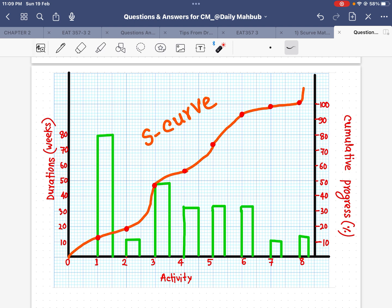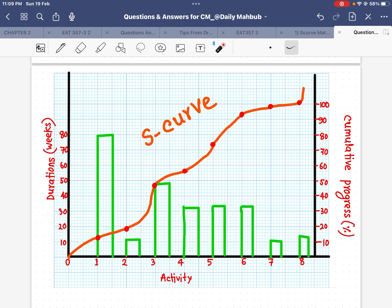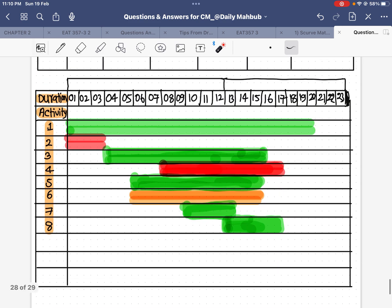For the S-curve, the first thing to do is set up the axes. The horizontal axis is duration in weeks — the total is 80 weeks, so I write 10, 20, 30, 40, 50, 60, 70, and 80. The vertical axis has the activities — we have eight activities total — and we also track the cumulative progress. I take values from the table and draw this diagram. For the first activity it took 80 weeks.